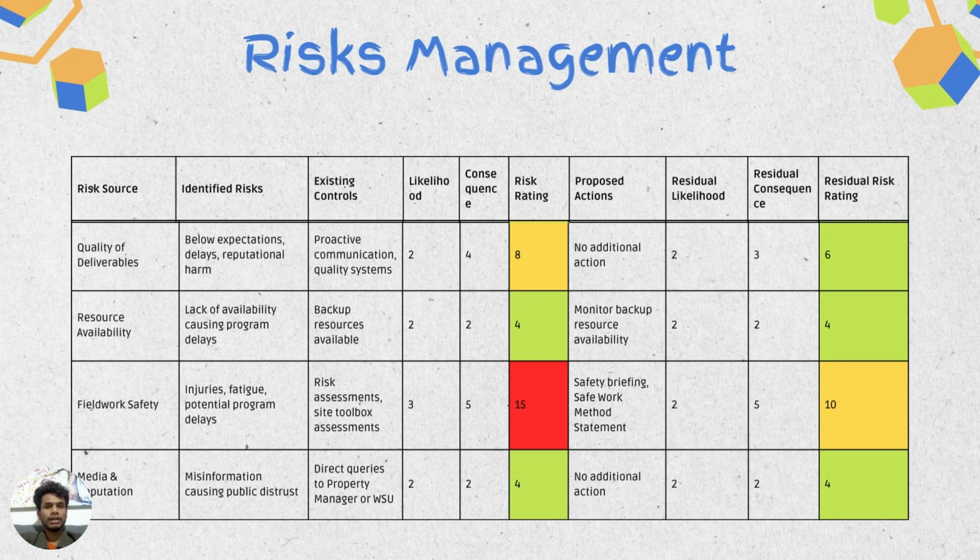In terms of field work, safety, injuries, and fatigue were identified as potential risks that could delay the project. We have implemented rigorous safety briefings and safe work methods statements, reducing the risk from 15 to 10.